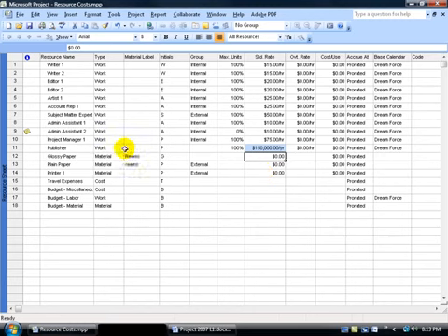Okay, we're out of our work resources, we're going into our material. No longer is it by hourly rate, it's actually just cost, and in this case it's per material label in reams for our paper. So how much is a ream of paper? Isn't it about 500 sheets? And this is glossy paper, so it's a little bit more expensive per ream, so we could say it's $25 per 500 sheets of glossy paper, or ream. So I can assign 4 reams, in which case it would be a total of $100. Again, it's $25 per ream, or sheets of 500. For the plain paper, it's not as expensive as glossy, so we could do $15 for 500 sheets or per ream. And then for the printer, we'll say it's $500 for 1 printer.